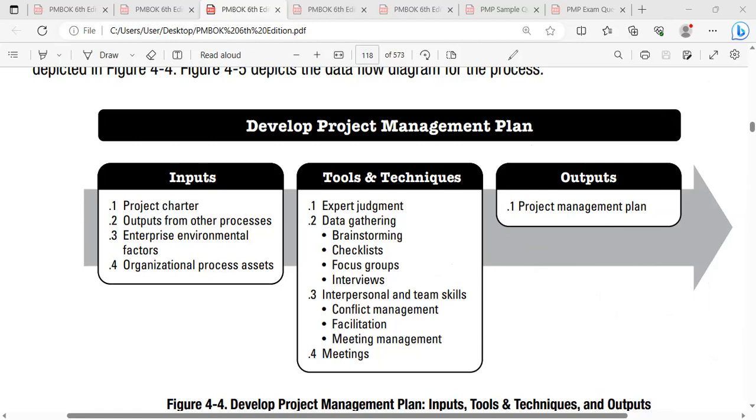The scope will be giving 2 management plans. The remaining knowledge areas will each give only one management plan. So a total of 10 management plans are integrated here, right? So the project manager will be waiting. You will be giving the deadline. Before this deadline, try to send your contributions.